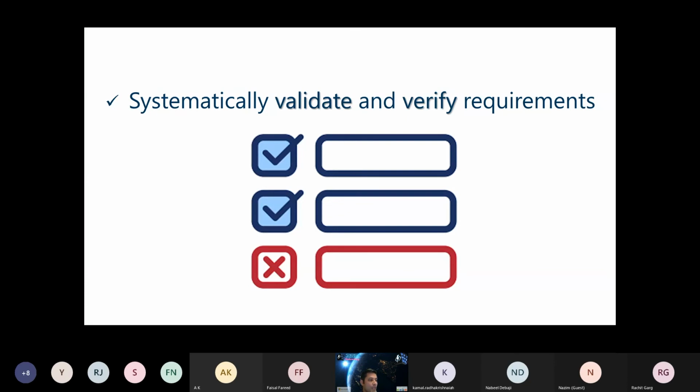Hence, we need to have requirements validation defined as the identifiable process that ensures that the business requirements are clearly describing the target solution that the client is aiming for. And the requirements verification process is confirming that the requirements are technically implementable, feasible, and the resulting architecture design would be satisfying the business requirements defined earlier.